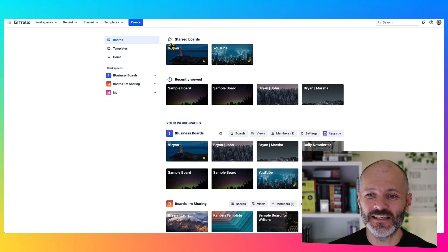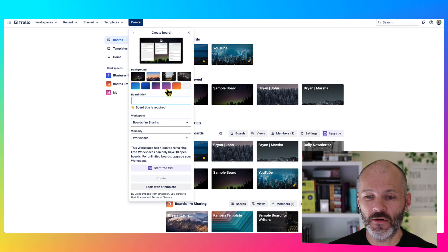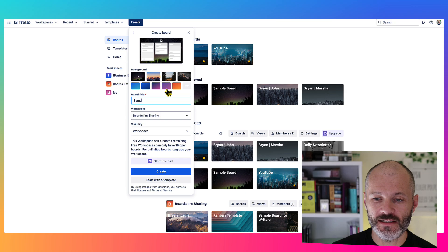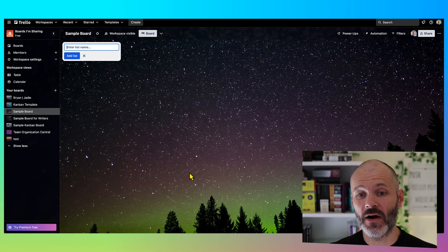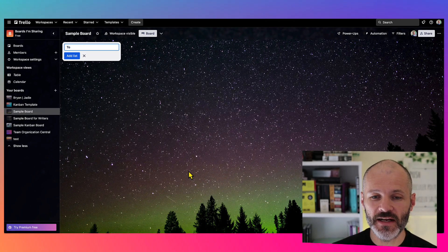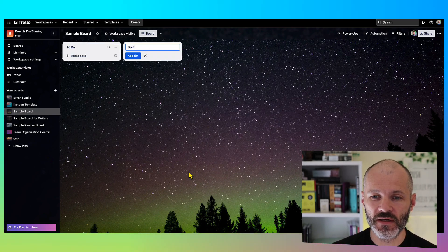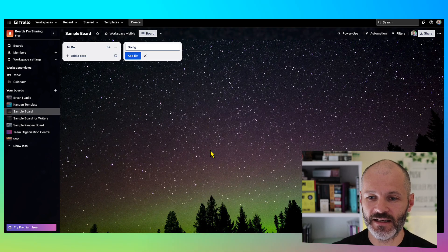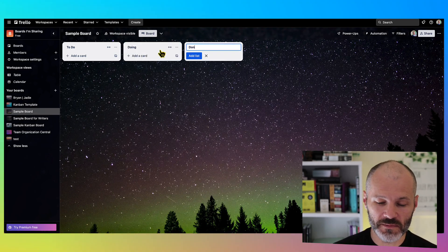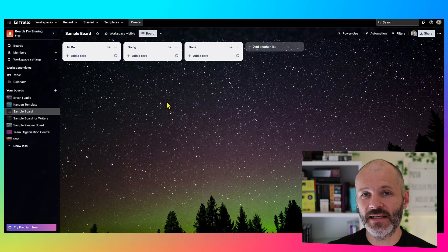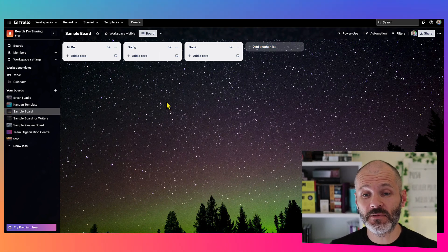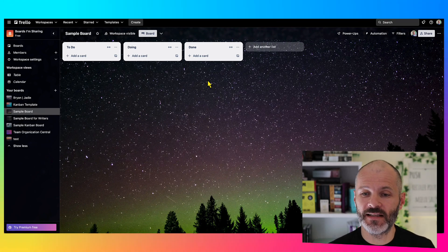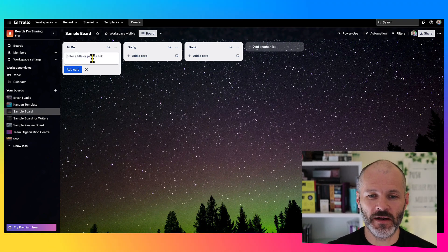Once you've created your Trello account, go ahead and create a board. I'm just going to call this sample board so I can show you some of the basic features before I show you exactly how I use Trello. And usually I create at least three columns: To Do, Doing, and Done. And that's because Trello works best when you base it on the principles of Kanban. Kanban basically describes visualizing all of your work in one place, in this case on a Trello board, and limiting how much you work on.